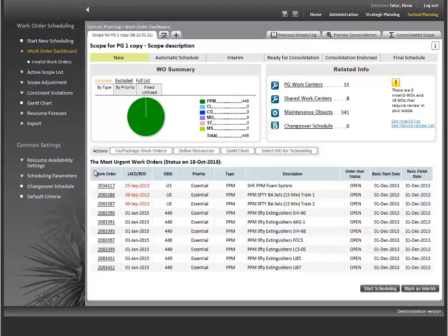As I said before, we always have more jobs than we can handle, and the pool of resources is limited. How do we handle it in our system? Each job has its own level of importance based on a set of parameters. The main three parameters we use are equipment cruciality, which means how important particular equipment is.